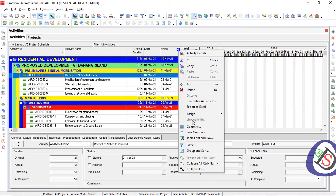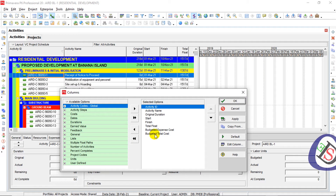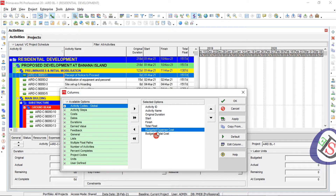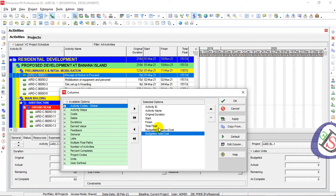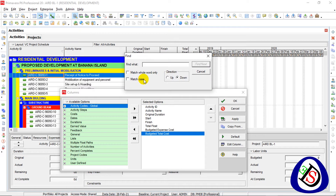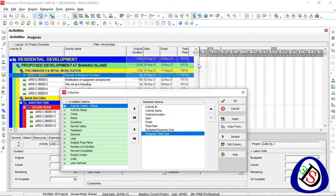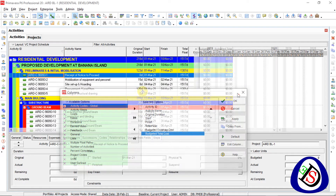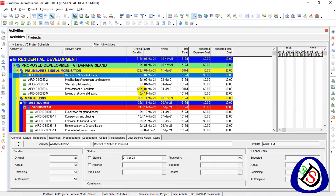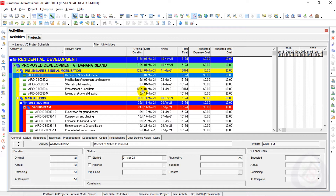First I will go to the columns and find two columns: Budget Expense Cost and Budget Total Cost. You can find Budget Expense Cost and Budget Total Cost here. It doesn't matter whether you have labor, non-labor, or material cost assigned — expense cost is a separate issue. I don't have any budget total cost here, so I will work with budget expense cost.